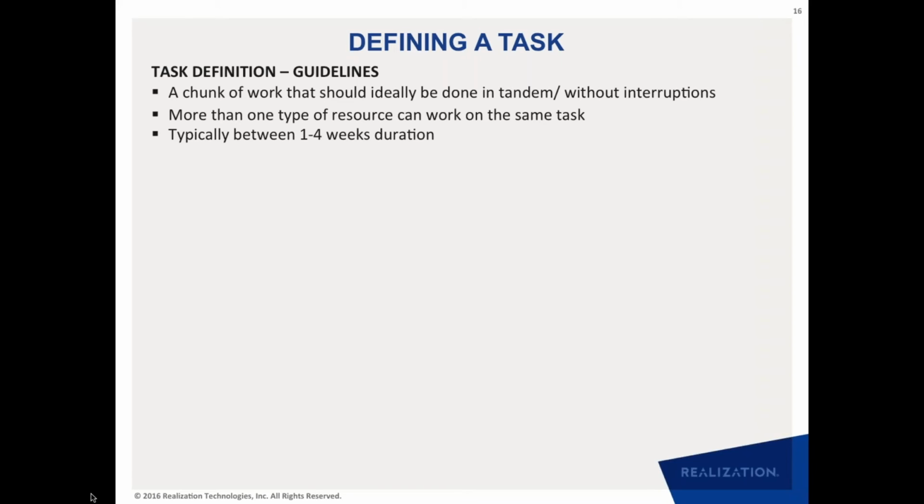But the analysis that happens in one department affects the decisions that are made in the other department, which means all these different analyses need to be done in tandem. So instead of declaring them as separate tasks in a project plan, what we are recommending is that they are just subtasks inside one larger task. And when you do that, you automatically force these activities to happen in a synchronized way.